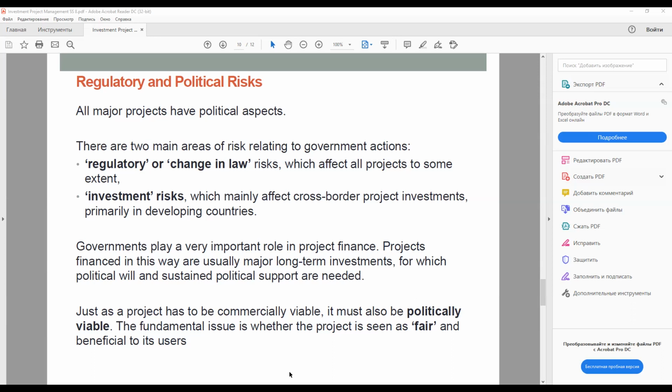And a high rate of return, which is meant to compensate for the risk, may paradoxically increase the risk if it becomes politically unacceptable. The project also has to be set up in a way that leaves the host government in a position to make future changes in the market in which it operates. For example, when signing a toll road concession, the government should consider whether it is subject to provisions such as non-competition, which could prevent the normal evolution of the road network.